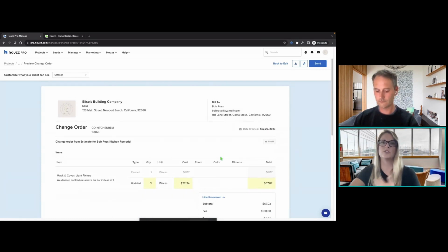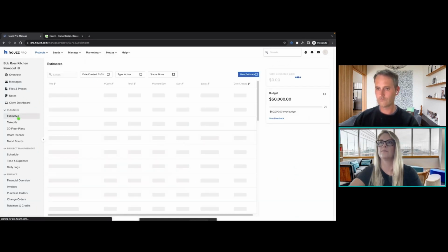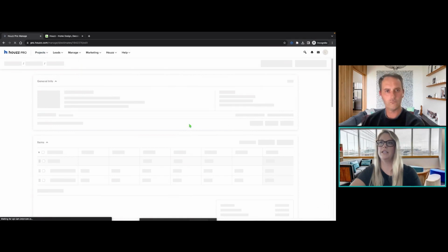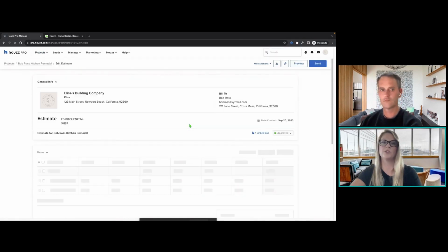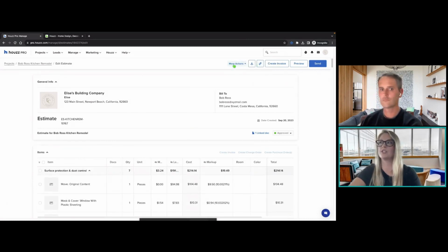I do recommend, this is just a best practice for me personally, I recommend using change orders for an increase in price. If it's a decrease in price, you actually can go back to your estimate. So if I go to his project again and go to his estimate page, the one we were just working on, if I need to decrease something, maybe we returned a product wasn't available. The change order, again, is a great tool for increasing price from the initially approved estimate.